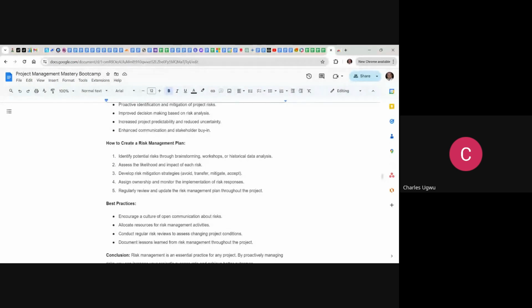During the RAID meeting, we go over our activities to see where we have potential danger or where we have risk. We look at our timeline, we look at our budget, we look at our scope, we look at team members, who is delaying deliverables, who is not submitting their deliverables. When you have team members that are not always submitting their deliverables, these are where risk can come from.